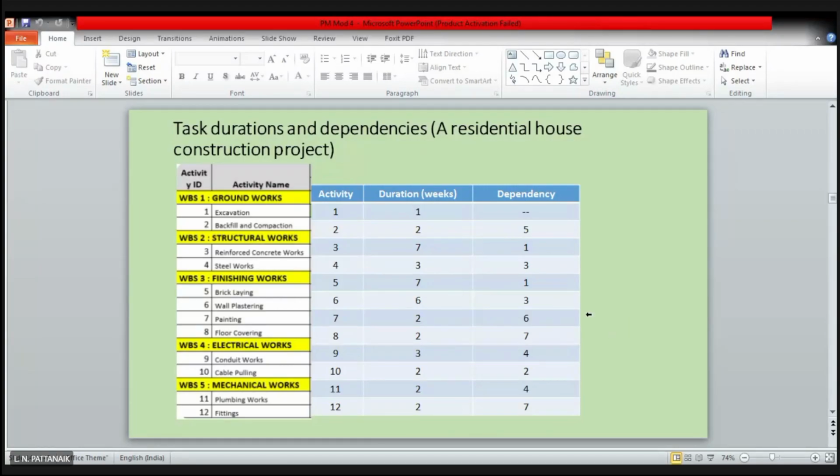Okay. So what I was telling is that you can check the rest of the activities are marked with activity numbers, or you can mention the description of the activity, and then the duration of that particular activity, the estimated duration of course, and then some dependence. As you can see, all the activities here, except activity 1, have some kind of dependency. Right? It is not necessary that there will always be one dependency. There can be more than one dependency also practically.